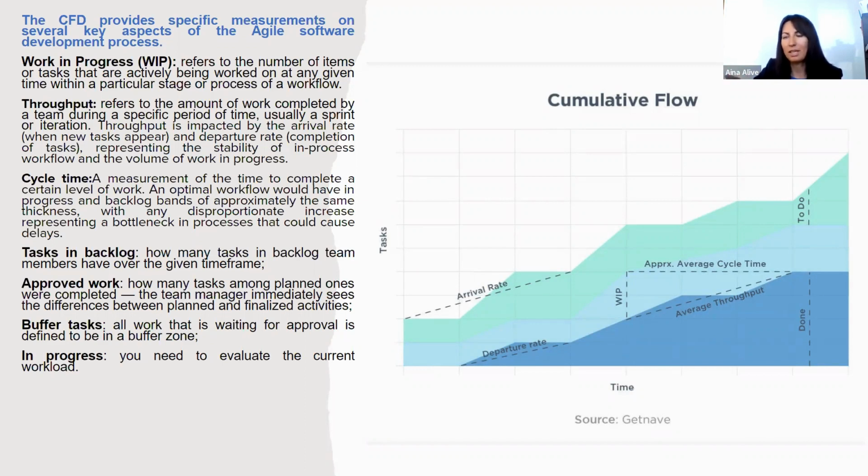One of the reasons why this is happening might be that people have too many stories started and are working on ideas simultaneously. And yes, Bogdan, stop starting, start finishing. That's what work in progress is about. We can limit ourselves, for example, to 3 stories to start, and not start anything else unless at least one story is finished. So it's not about the time spent on the story, but about the number of stories you are working on simultaneously.